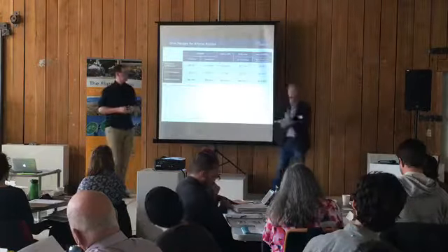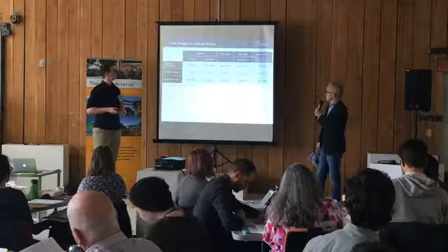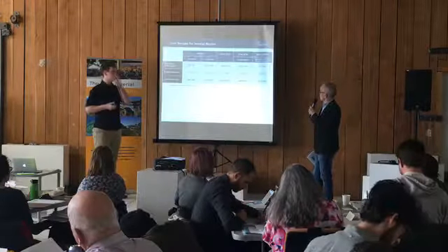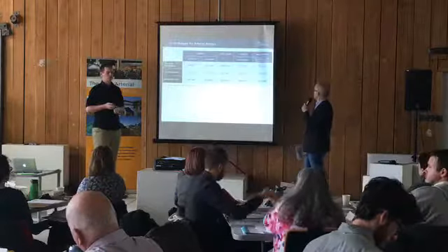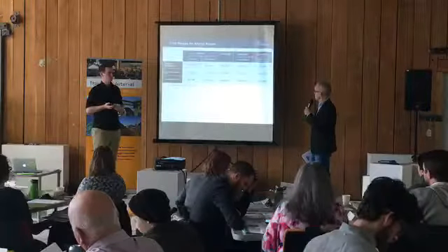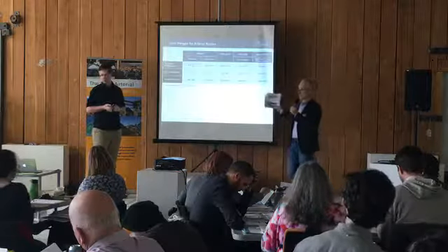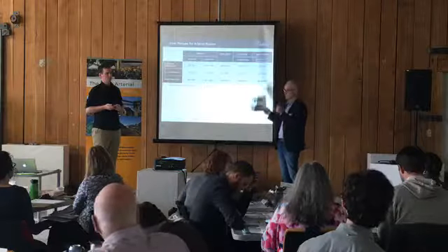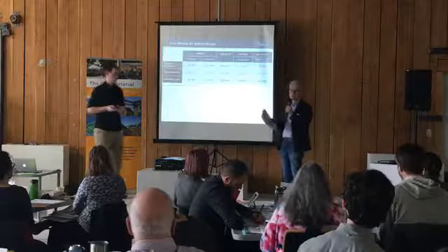Thanks, Jared. So the park costs have ranges like the rest of the costs to indicate that they're order of magnitude planning costs. And basically they break down into broad categories of park acquisition, which you can see generally is the largest cost, and then park mitigation, which are the other things that I mentioned for total park costs. They rank a little differently than the overall costs excluding park costs, but when these park costs are added in to the overall costs, they don't change the ranking of the overall costs of the options, if that makes sense.